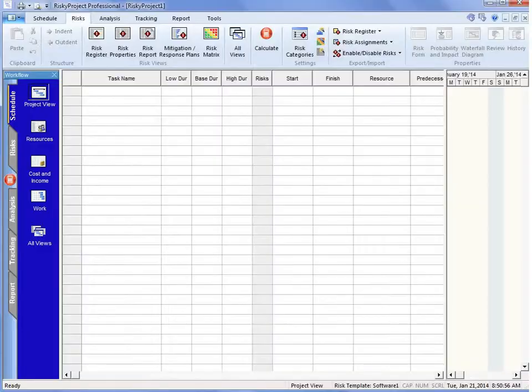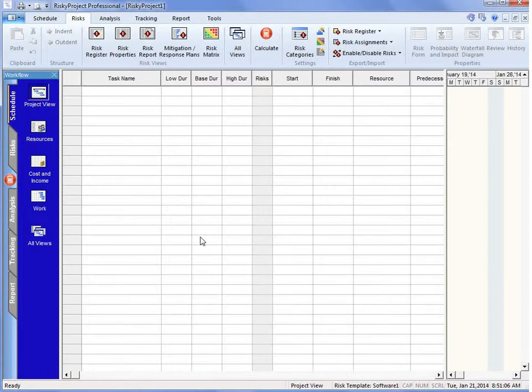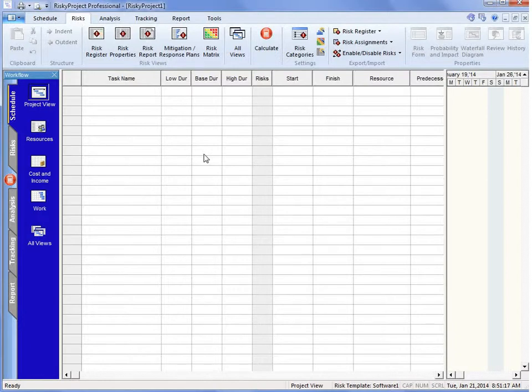Risk categories are very important in your risk register because they define the different types of parameters that you're going to be looking at during your analysis, especially if you're doing qualitative and you're looking at non-schedule, non-cost risk.